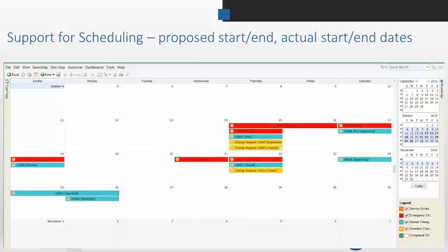We used to have people say, oh my gosh, I never want my end users to see change schedules. Well, guess what? Business stakeholders are really knowledgeable now and feel that they need to be in the know of the things that could potentially impact their environment going forward. And so this forward schedule of change is available within the tool itself, can be pulled up within a change ticket, pulled up outside of a change ticket, but it's also available out on the portal. And you can limit the amount of information that's available to the end user, but at least you're allowing them to see what the upcoming changes are for the weekend that could impact their business services.